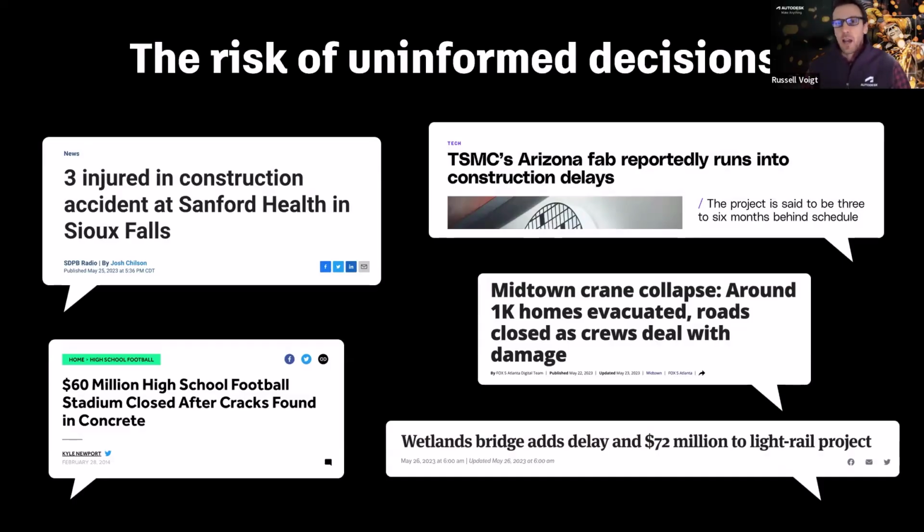I can think back to one project where we had a precast structural erection on the schedule a few weeks ahead, and I noticed we had missed a submittal for a PE stamped pre-engineered erection plan that's meant to aid the process and make sure that the unfinished structure, as it's built, is safe and sound. All the pieces go together in a certain order. All the joints and connections are going through a process that makes that safe.